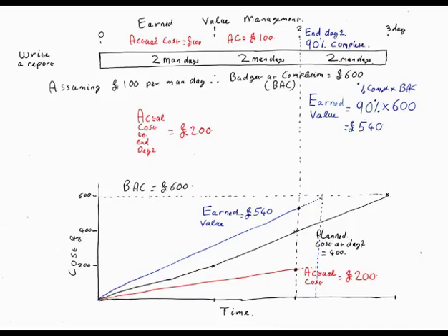And that one person has had a really good run and achieved 90% of the work. So my expenditure so far, my actual cost, is I had one person on the first day, one person on the second day. So I've spent how much? 200 quid. So £100 a day, so I've spent £200. So if I plot my actual cost on here, actual cost equals £200.